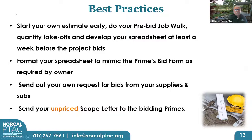So best practices. Well, obviously start your own estimate early. Your pre-bid job walk, your takeoffs, quantity takeoffs, and develop your spreadsheet at least a week before the project bids. I would suggest 2 weeks, but everybody has a different discipline habit. So I'm just telling you what I recommend.